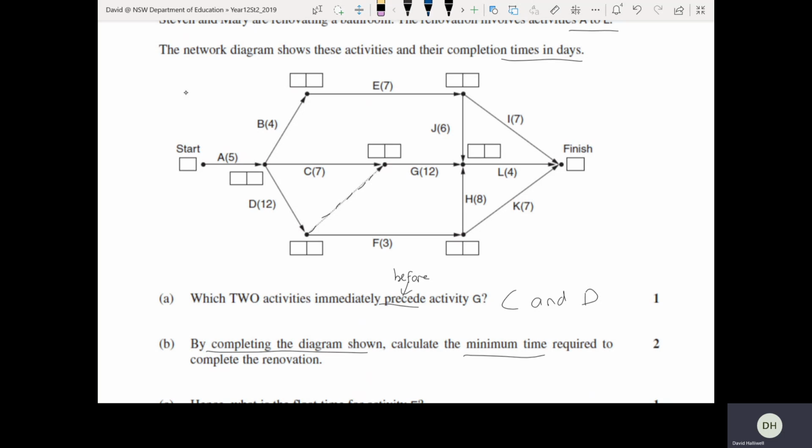So remember for every activity at the beginning we put a box like this with a line down the middle. So for the start, it's missing an extra box there. Now here, B, C, and D lead off, and they've only given us one box, but you should have a box here for B, one box for C, and one box for D. That's the way that we've taught it, so we'll follow one like that. The dummy doesn't get its own box because the dummy is D essentially.